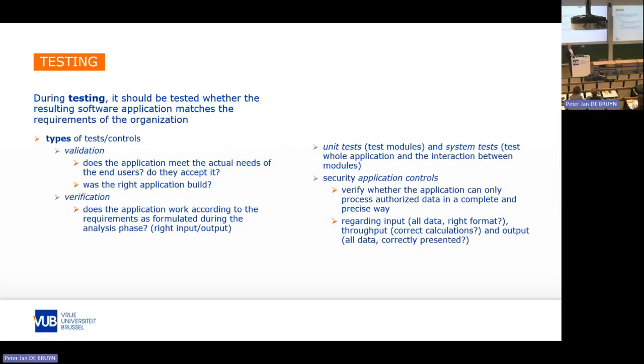If you wait until the whole product is delivered and then end users start saying, but we would like to have this and this and this adapted, while they could have said that earlier during the test, then of course you hamper the successful completion of that project significantly.